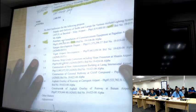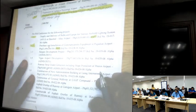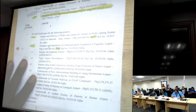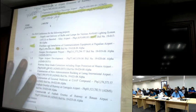Questions? So, yun ang sa item 1 or sa item 2 requirement. Sino ang para sa item 1? A reminder lang dito sa mga bidders, no? The question with regard to the eligibility. Yung bid docs natin should be properly tagged, with complete pagination. And each page should be signed by the authorized company representative.